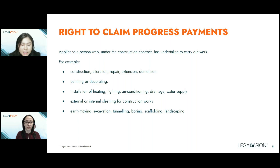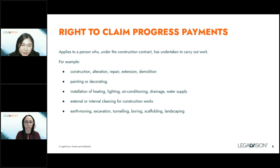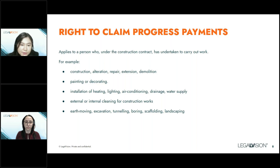The New South Wales SOPA legislation covers only works carried out within New South Wales. Sometimes contracts say they're governed by the laws of New South Wales, but the works are being carried out in Queensland — in that case, the Queensland SOPA legislation applies. This is an important point because each state has different timelines for payments. To avoid confusion and ensure you don't miss strict deadlines, it's important to have a lawyer review your agreement to make sure you invoke the correct legislation and follow the right process.